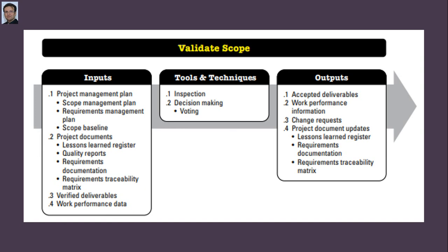And you need quality reports as well, because a prerequisite to this process is requirement work where we actually correlate with the requirement. The information presented in the quality report may include all quality assurance issues managed or escalated by the team, recommendations for improvement, and the summary of findings from the control quality process. This information is reviewed prior to product acceptance.